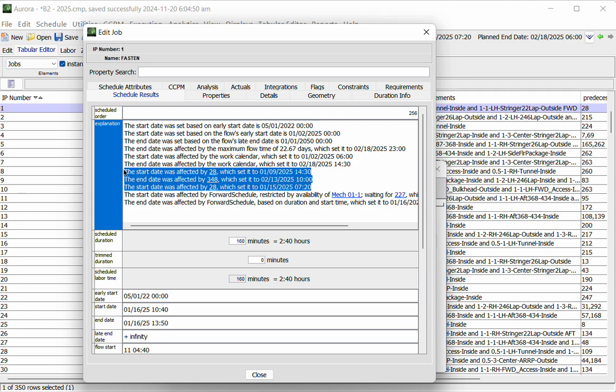Now you can see that the same predecessor is shown twice. The reason for that is the first time is preliminary propagation before I've actually laid anything in the schedule. So this is basically reflecting my pure temporal schedule if I didn't have any resource contentions. And then this one is after the predecessor, job 28, had scheduled. This bumps it over further.